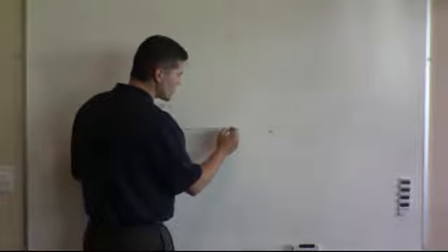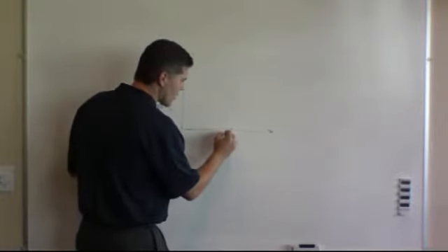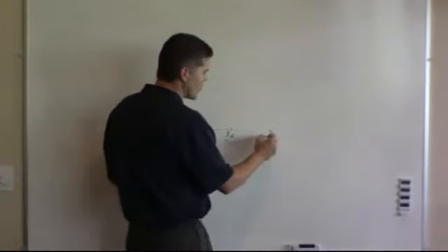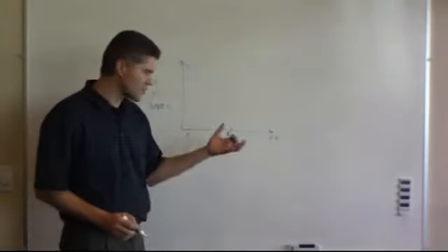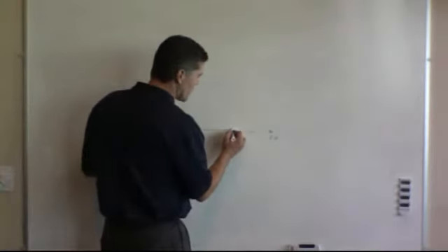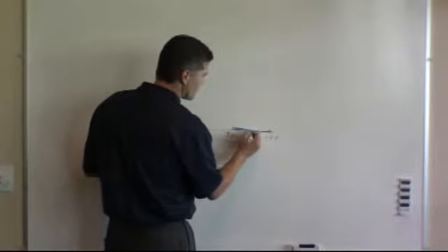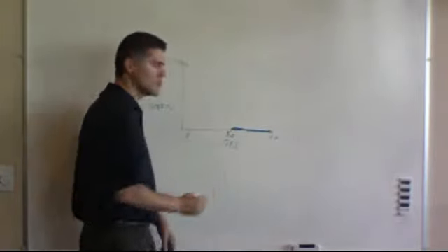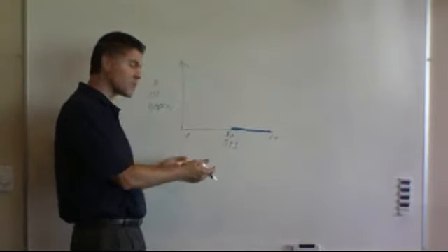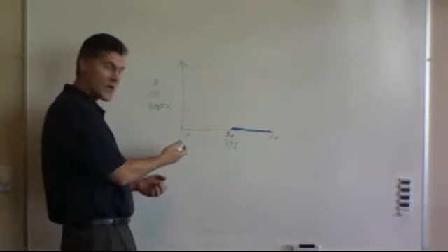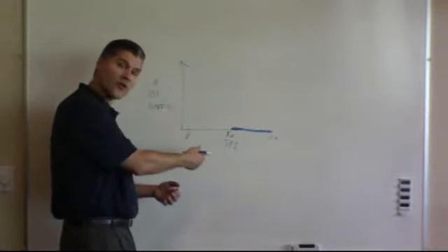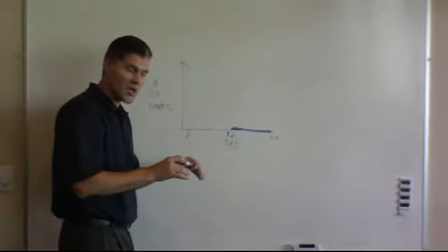Now, so there's our 1.0 value for SPI. We've got 0, and the chart goes up to 2. Now, the number of overtime hours, generally, you're going to set something that says, as long as I'm ahead of schedule or on schedule, I'm not going to add any overtime hours. Now, where it gets interesting and where you put your preference is what happens when you start to get behind schedule. So on the x-axis going this way, that represents further and further behind schedule or more and more schedule pressure.